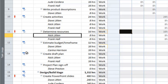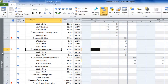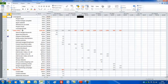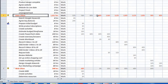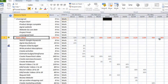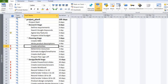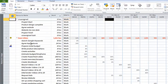The reason it's called task usage is because the main focus here is the name of a task, and indented it shows the resources in italics assigned to each task. Let's use the quick menu here by right-clicking and look at resource usage. This is a very similar view, but in this case it's organized by resource. My name's in red because I'm over allocated. Can you see how valuable this is? It actually shows you the point in the time frame where the over allocation is appearing - whereas in the Gantt chart view you have no idea by how much and when.